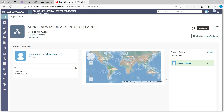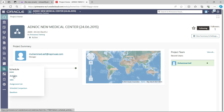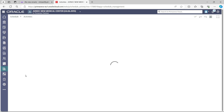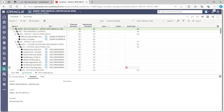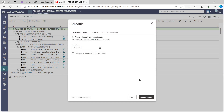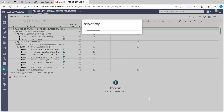Once the program is imported, click on the program and go to Schedule. Clicking the program shows you the project name, start and finish dates, and basic information like project manager. To see the activities, go to Schedule and select Activities. The activities will appear — the Activity ID is in the second column so just drag and drop it to the required location. You'll notice no start or finish dates are shown, so you need to schedule the program — press the Schedule button and select Schedule Now.